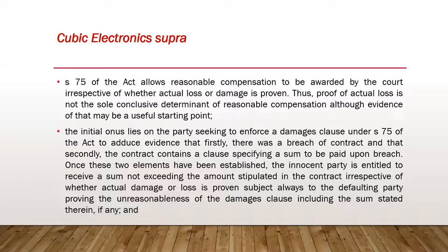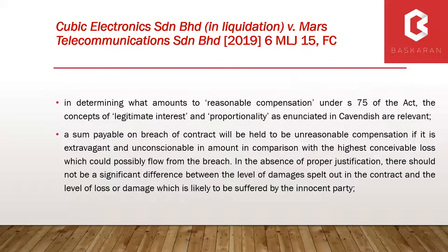Most in the industry think it will be quite difficult for the contractor to prove that the specified damages are unreasonable. Some guidance has been offered by the Federal Court in Cubic: so long as the sum reflects a legitimate interest or is proportional, it is unlikely to be unreasonable. However, if the sum is extravagant or beyond anything the employer could have possibly suffered, then it is likely to be unreasonable.